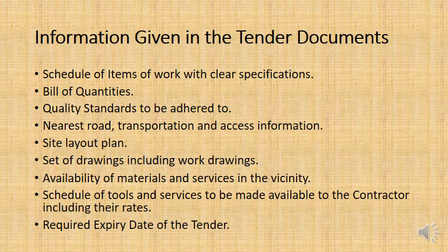It's an itemized estimate, if you like, but it needs to be fairly accurate because you're going to have to charge work at that cost. So if your bill of quantities estimate is underestimating the work, as a contractor you will be making a loss.